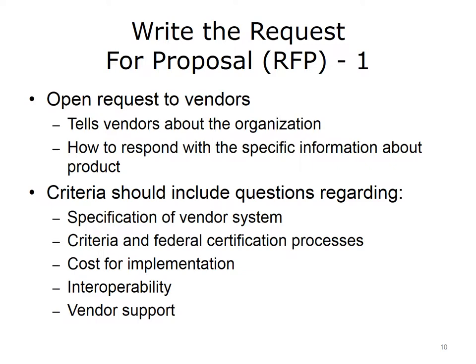Some organizations may have an interest in prioritizing electronic documentation systems and online order entry systems. The RFP allows vendors to compete using the characteristics specified by the organization, and it helps the organization find an EHR vendor that can adapt to its unique specifications. The RFP should include questions about how the vendor plans to meet meaningful use criteria and federal certification processes, the cost of implementation, interoperability issues especially if the organization already has a pre-existing EHR, and the extent of vendor support during the planning, implementation, and post-implementation phases.